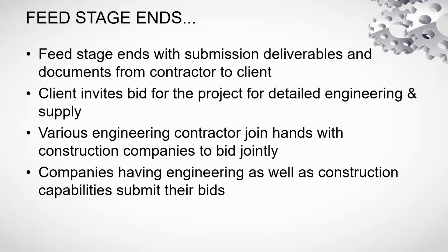Yes, there is a review which is carried out by the client, by end users, or if the client is not in a position to have their own in-house team, they usually employ project management consultants, which are responsible for review and assurance of technical correctness of these drawings. So either the PMC or the client's own team reviews these documents at various stages.